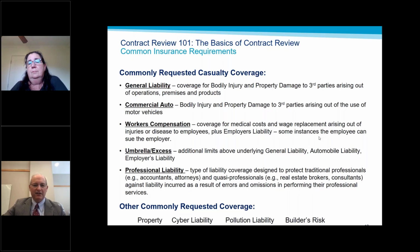and the city carried the builder's risk coverage, but the architect and the builder screwed up in not putting in a threshold, like on a community center. They had a major rain event, and it got wet inside. The flooring had to be wiped out, and we came in because we had the builder's risk coverage and paid that. But we would have liked to have been able to go back against the architect or the builder, and because they had that waiver of subrogation, we couldn't do that.